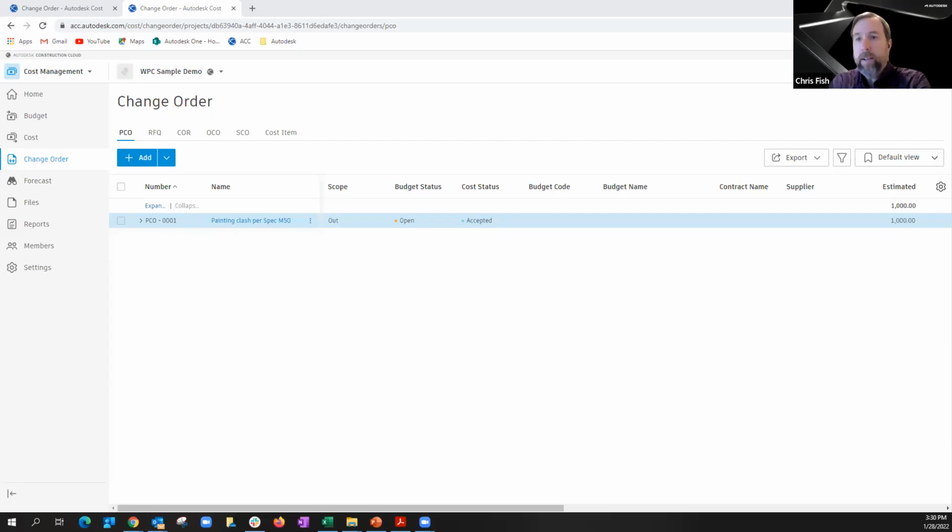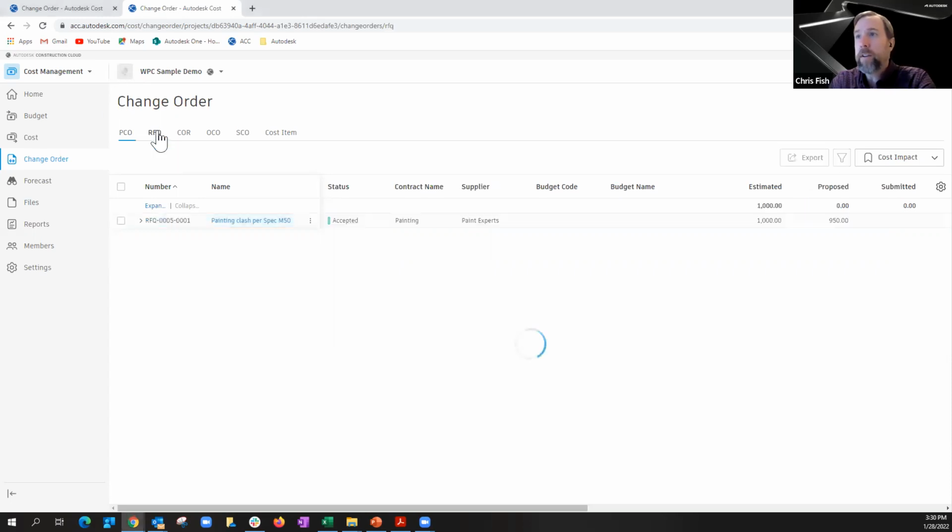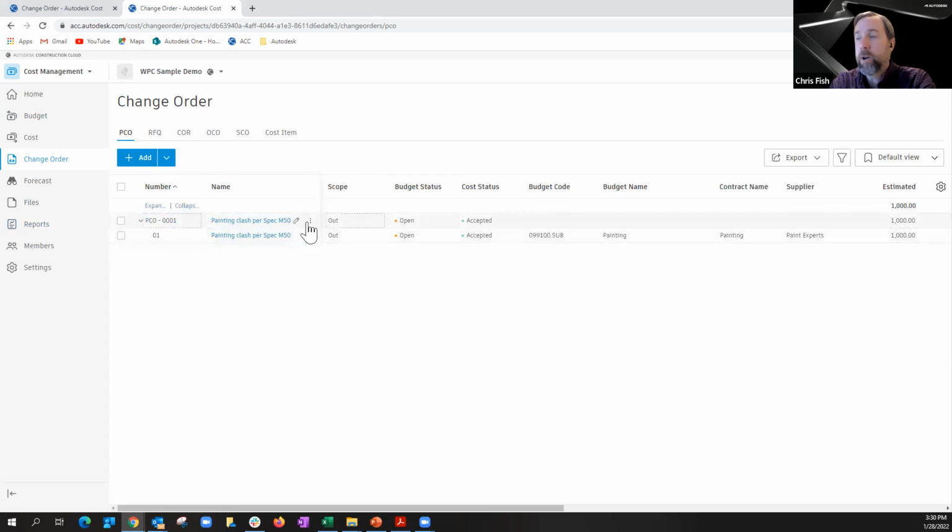Hi again, and now we are going to continue with the change order management process. In the previous video, we created a PCO, and we also sent it for a quote to Paint Experts, to Peter Paint, and got his quote back at $950. So now what we want to do is send this change to our owner.